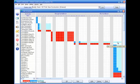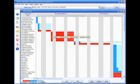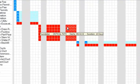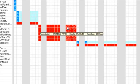The letters in the box indicate the status of the item scheduled on that date. C means conflict. This appears when a resource, such as an employee, subcontractor, or equipment, has been scheduled for more than one job on that date. I'll talk more about that later.